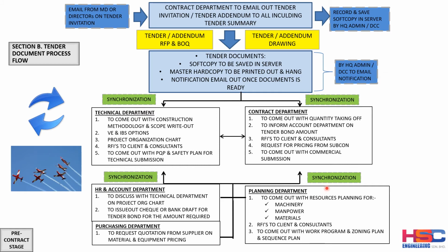Okay. Next is the planning department. The planning department also plays a significant role during the tender stage, because the planning department needs to come up with the resource planning for the machinery, manpower, and materials.